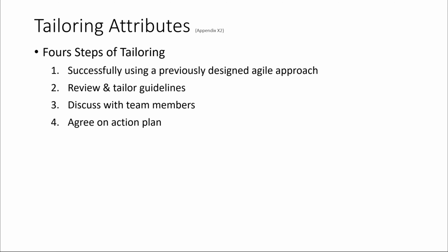How to use this appendix? Or let's discuss the 4 steps of tailoring. To benefit from the guidance listed in this appendix, which will be discussed in a separate video, we recommend first successfully using the agile approaches as designed. Then review the tailoring guidelines that match the situation and read the associated recommendation. Next, discuss the change with the people it will impact and agree on a course of action.